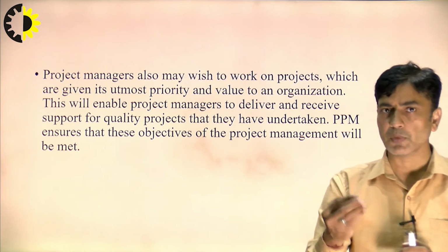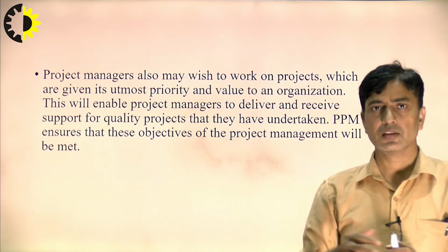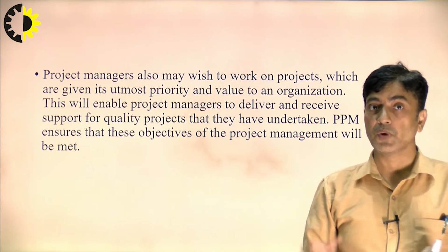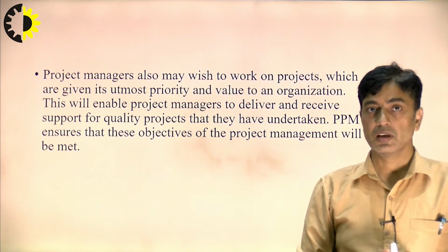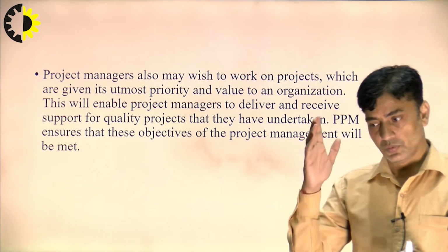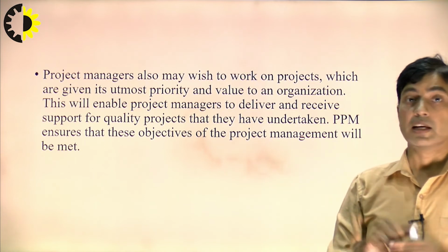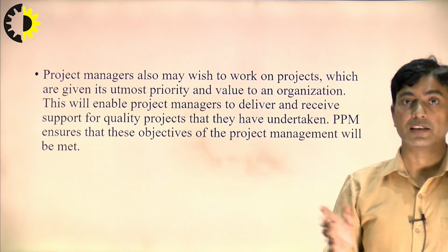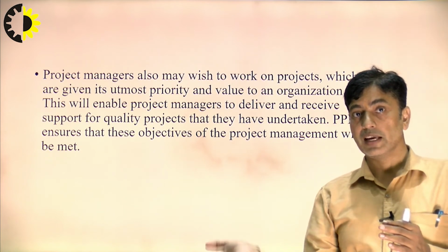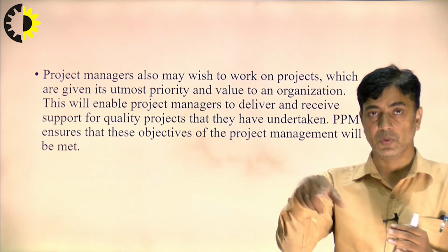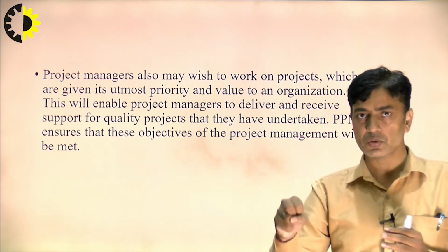Some projects may be delayed 1 day, 2 days, 3 days, even 1 month, but some projects are very critical to the time. That means you have to complete them at any cost within time. So, that type of project is given the priority. You have to assign the resources to that type of project first. When they complete the task, you can release that resource and assign it to some other project.